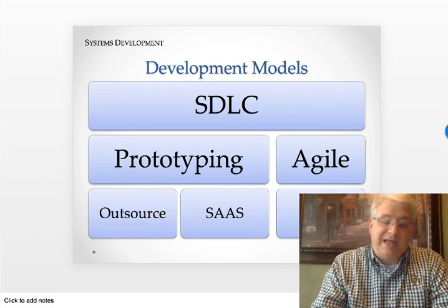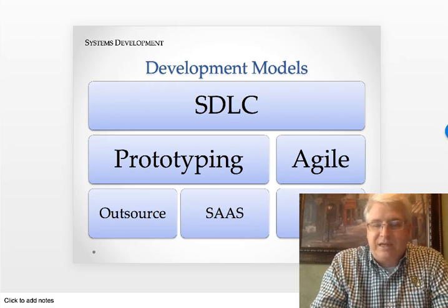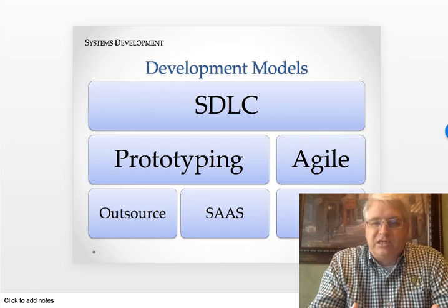It basically asks 3 questions. What did we say we were going to do? What did we actually do? And what are the impediments to us moving forward on the next steps? And you just meet on those things very quickly.